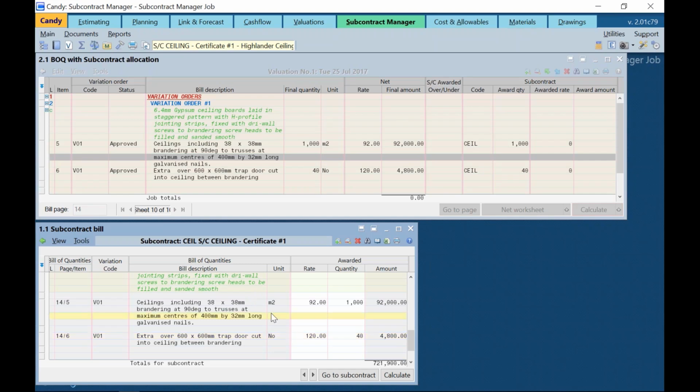Right, so note that the VO items copied into the subcontractor bill from the main BOQ will appear as VO on the BillSmart subcontractor recon once they have been progressed for the month. Before the BOQ items are copied into the subcontractor bill, please always make sure that the VO codes have been defined and allocated against those items.